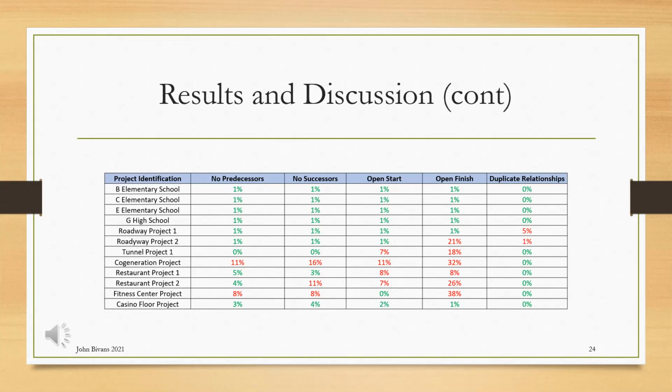With respect to project density, of the 6 schedules that failed to meet this metric, 5 of these projects had a project density of less than 150 activities. As a result, it can be assumed that as the project density decreases, the impact of the open finish metric on the project schedule increases.